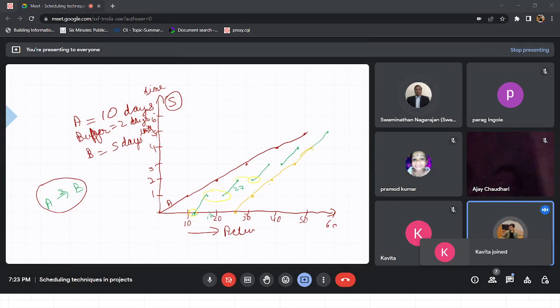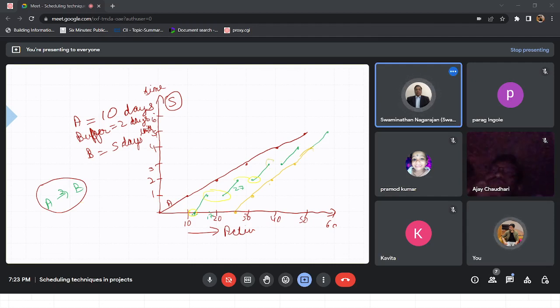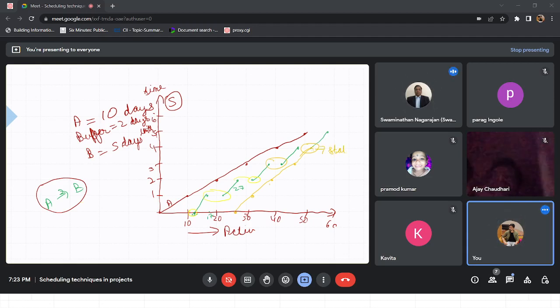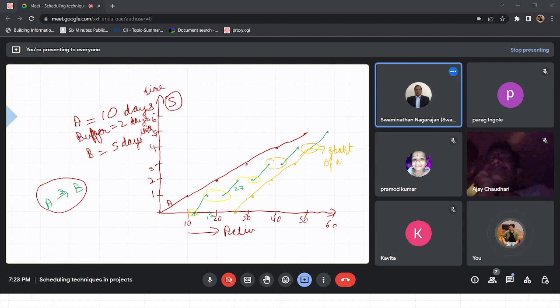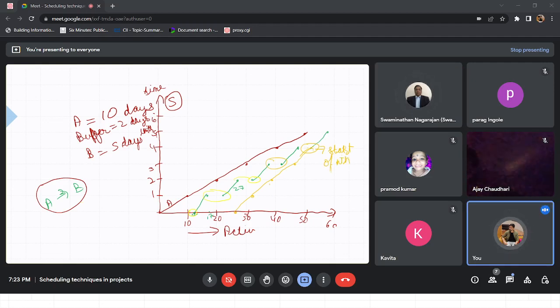So as you can see, if we went without adjusting for n-type buffer, the logic of LOB falls. But if we maintain that, okay, we have to take n-type buffer here in the n minus 1 for A, for B. I mean, we didn't adjust in, where did we adjust? We adjusted at the start of nth unit. If we adjust here, it will follow everywhere.